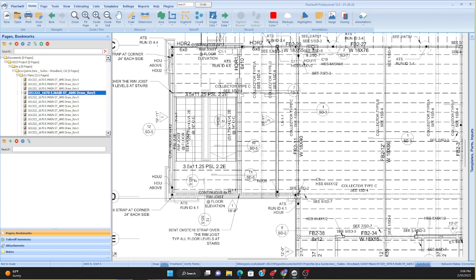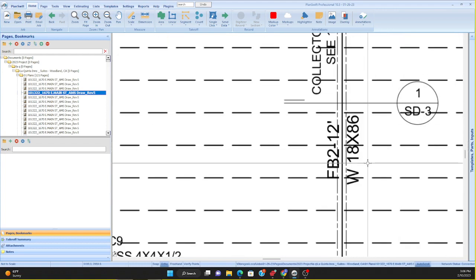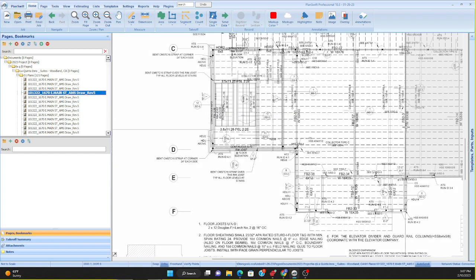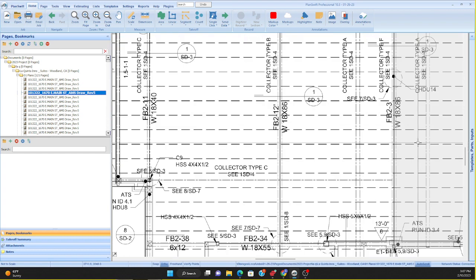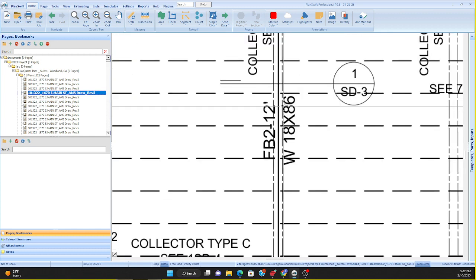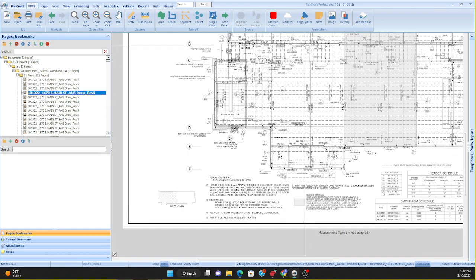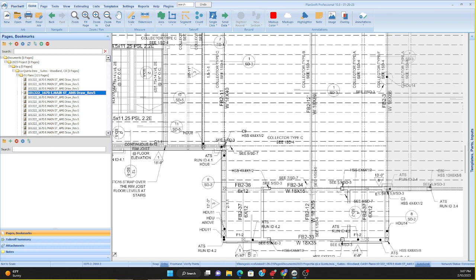Okay, fabricated metals, because these are fabricated, meaning that you order them as you need them based on everything we got going on here. The W and I beams, again, that second digit indicates how many pounds per linear foot the beam can hold. And so you measure how many linear feet in total you have of that particular beam, times it by that second digit. That's how many pounds that beam is.